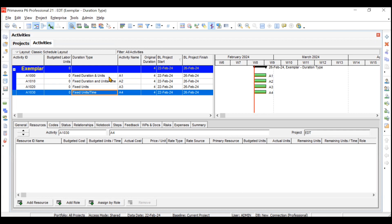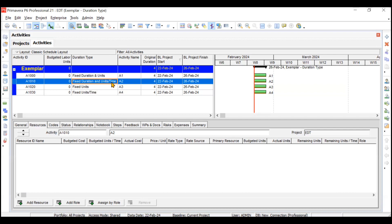For example, if I add one mason to this activity and that mason is doing 10 hours per day of work, then the budgeted units will be 10 multiplied by 4, which equals 40 units. Now if you add one more mason, the budgeted units will not change from 40 to 80. That means for this activity the time and schedule are fully constrained — the number of units is fixed and the duration is also fixed.